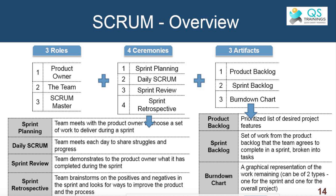Then we have three artifacts. The product backlog is a prioritized list of requirements maintained by the product owner. The sprint backlog is a subset of the product backlog decided on the first day of the sprint after the sprint planning meeting. And then we have the burndown chart.